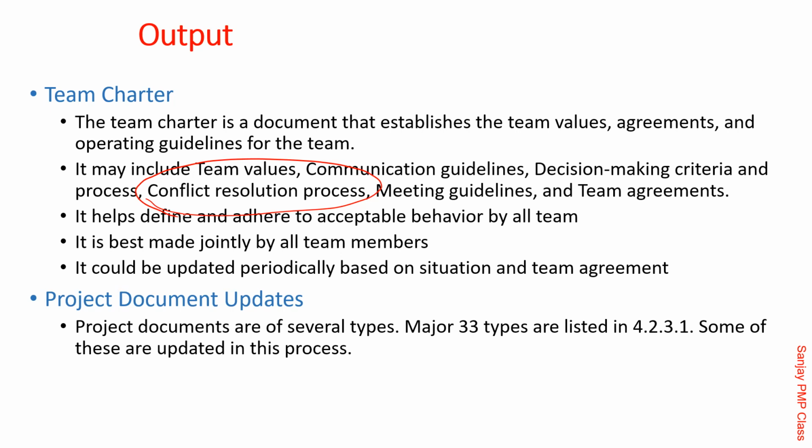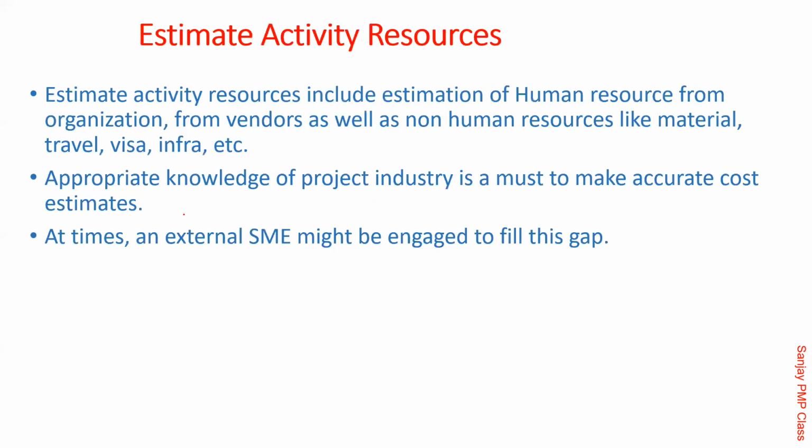Putting it into the team charter, probably at most a sentence. Aniruddha might come saying that if there are conflicts, all of us agree that we'll first of all sit together and try to resolve, and only if it is not getting resolved, then we'll go to the project manager. Those types of things could be written there in the team charter, but conflict resolution on its own is important. Yes, Aniruddha, does that make sense? Yeah, it does. That's how it is done there.